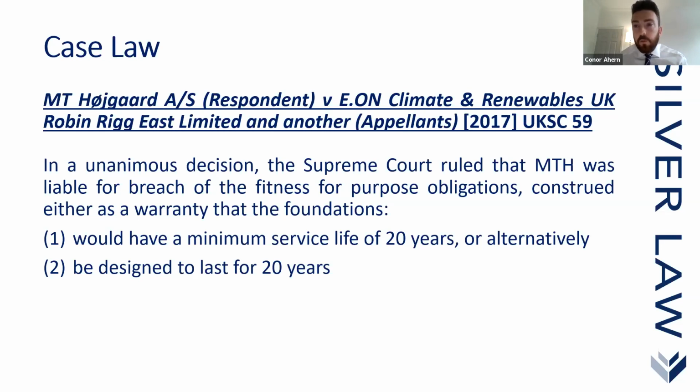In this case, for the court to employ a fitness for purpose obligation, obviously that is pretty much the highest standard that the contractor, or any designer for that matter, can owe to the employer. Usually when we're talking about design standards, we're talking about reasonable care, reasonable skill and care, largely in line with the Sale of Goods and Services Act 1982. But here we have a fitness for purpose obligation, which we don't see quite a lot of in industry.